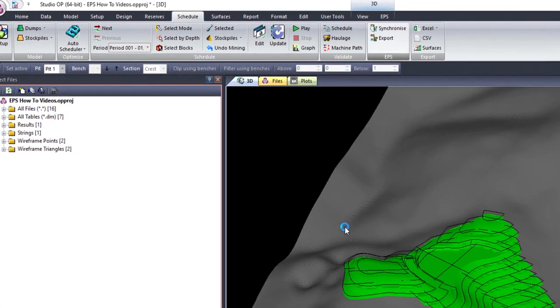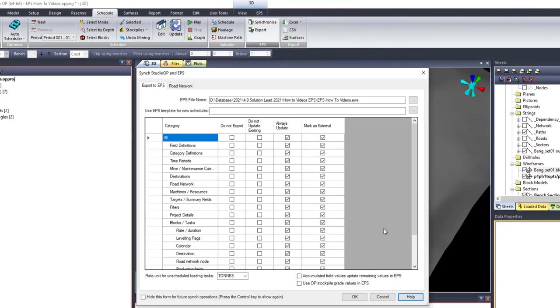With the synchronization approach, EPS must be installed on the same workstation as Studio OP.